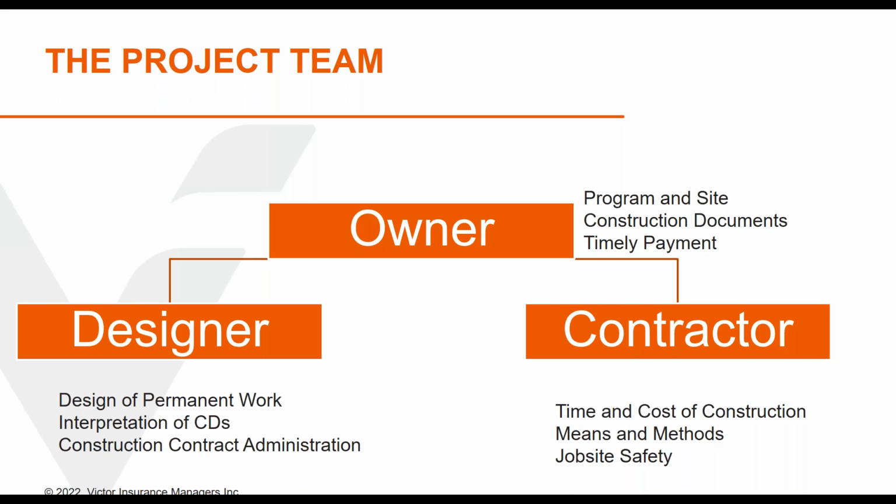Now, as you know, in a design, bid, build environment, there are two separate contracts. There's the contract between the design team, that's you, and the owner. And your responsibility is obviously to come up with a design solution for the owner's needs, for their program requirements. And during the construction phase, you will be responsible for providing an interpretation of what those documents mean and administering the construction contract that exists between the owner and the contractor.